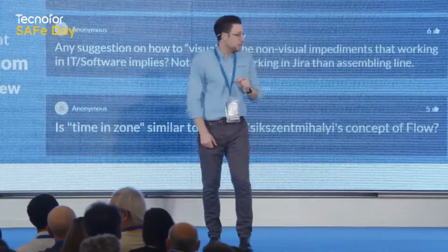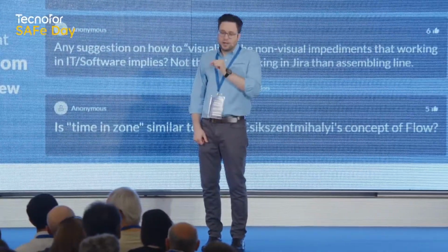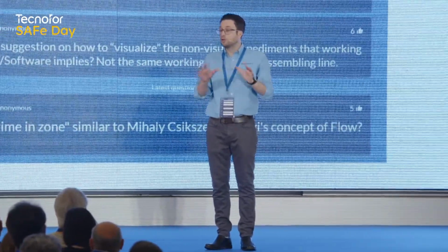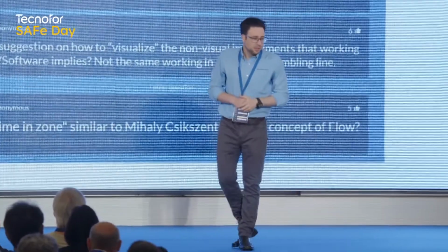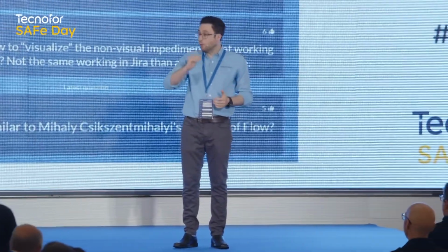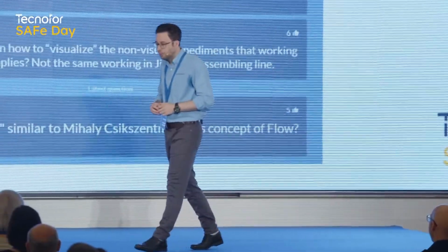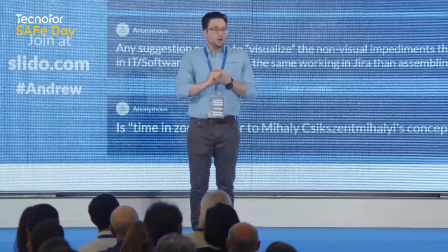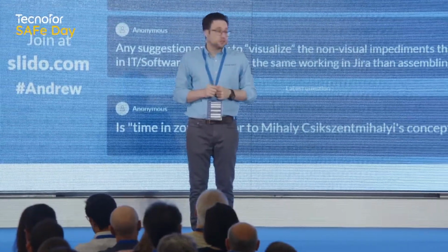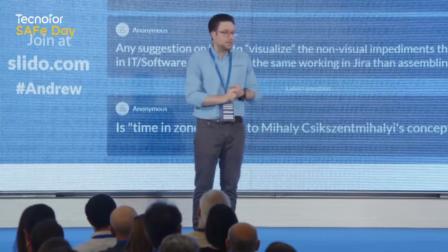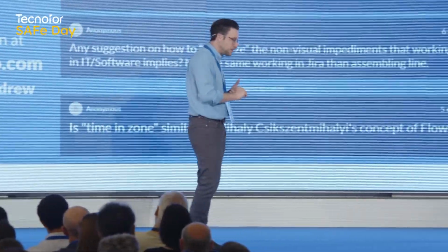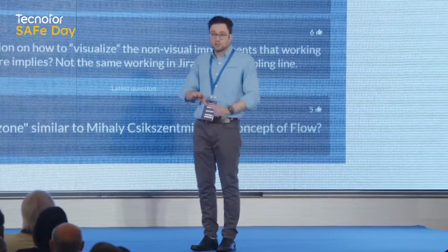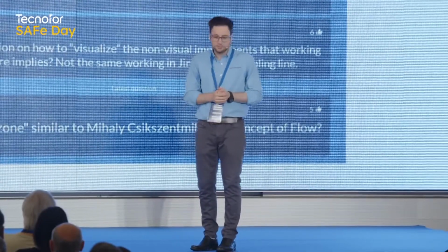Maybe I could just say two things quickly in conclusion. One other thing I'll say in the flow metrics article that is useful is that we're not suggesting you measure all those flow metrics at each level of the framework. We need you to measure flow in some way at each level, and I gave you some examples. But one thing we say in the article is ask yourself two questions. When you think about adding a new measure, ask yourself, what question will that measure answer today that I can't answer without it? And the second question to ask is, do I need to answer that question right now? We want to make sure that people aren't measuring too much. It becomes a huge burden if we do that.